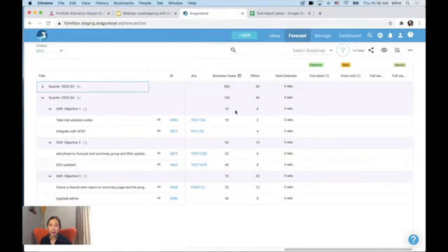As you can see here, I add something called the business value. Again, this depends on whether your company wants to use this method or not. You don't have to, but we recommend it because it's very hard to say what is the benefit of working on feature ABC. So the goal is, we tie each feature to objectives, and then we say from 0 to 100 how much this feature is going to contribute to achieving this objective. Let's say our objective 3 is about retention. We'll improve our retention from 85% to 90%. Then we'll say if we work on this feature, we can help achieve this 30%. So if we do 3 or 4 features like this, we can achieve our retention goals.